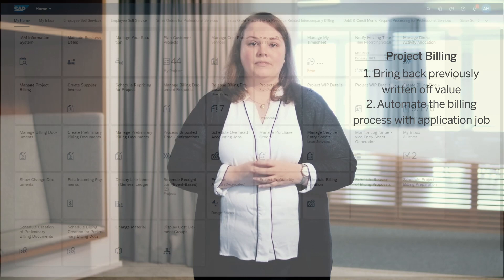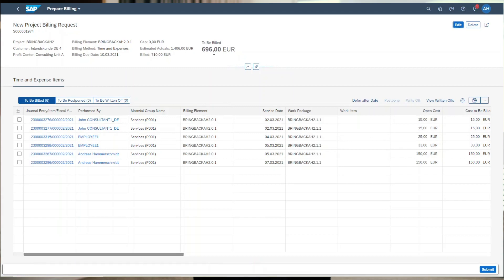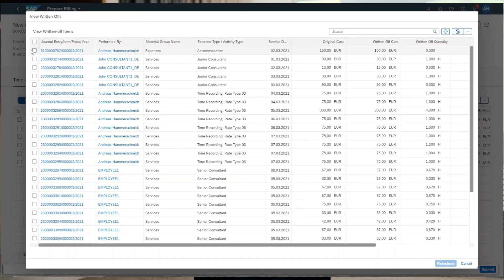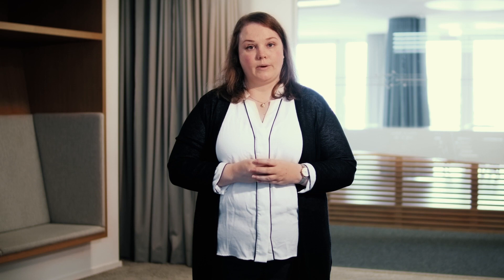Let me kick it off, as in the last releases, with two innovations in the new project billing. With this release, we're extending the functionality even further. First, we're adding the possibility to bring back previously written off values so they can be included in the bill again. This increases the transparency of formerly written off items. It also supports a project billing specialist or billing team member in re-including these written off items from earlier created billing document requests.